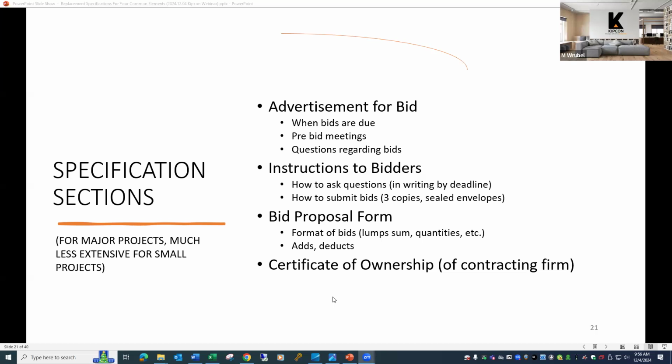It may also include in the base bid any sort of repairs to catch basins which are apparent and that are known to be needed. Or if, for example, something is going to be added, like speed humps, for example, or an automated gate or something of that nature. If you know that the project is going to include it, it goes within the base bid.